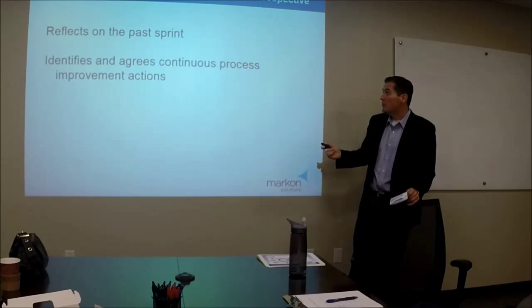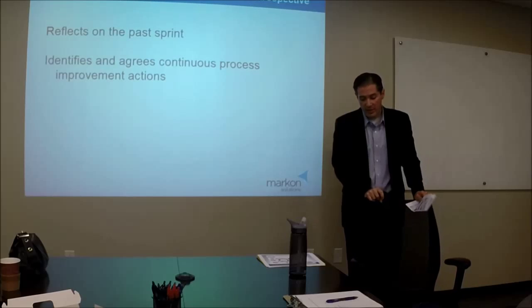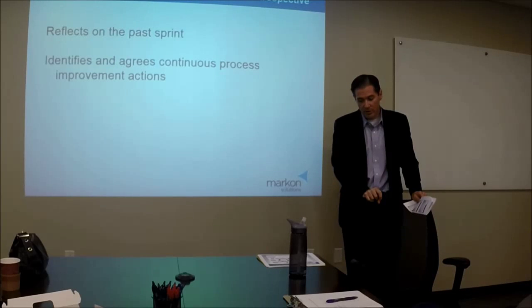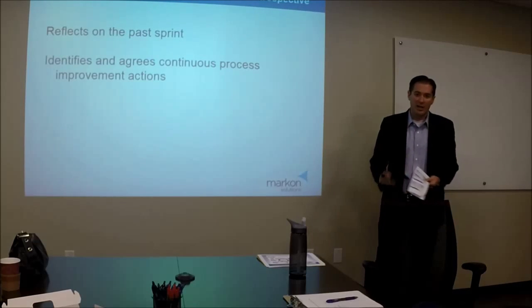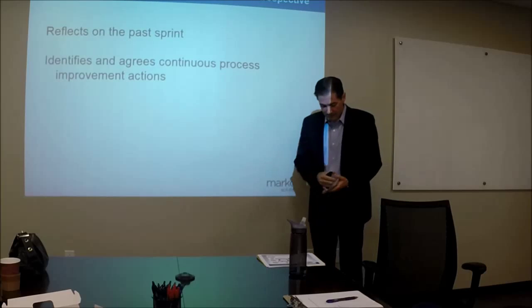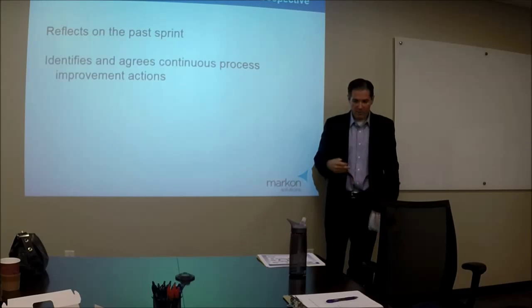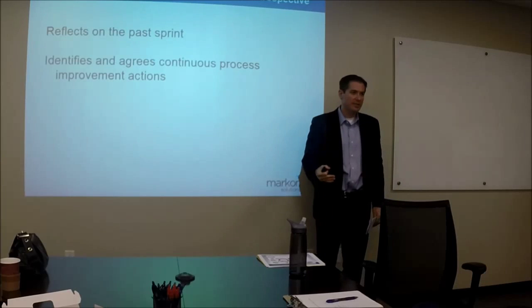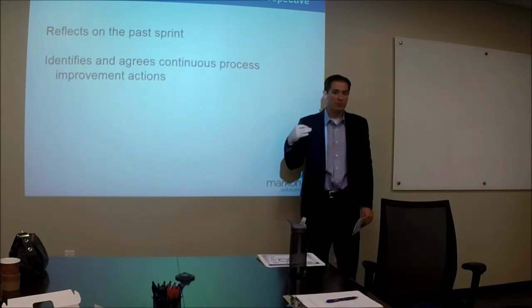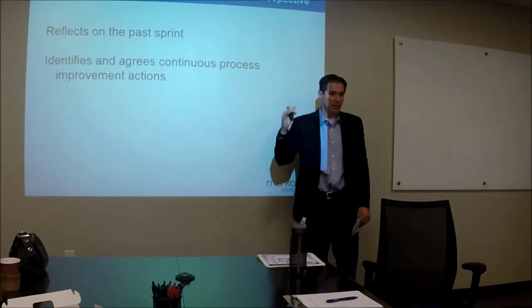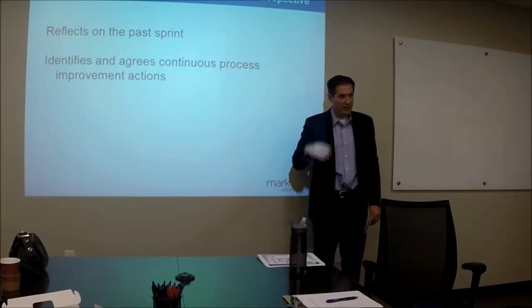After you've presented your shippable product to the product owner, best practice is that you have a retrospective right afterwards. The retrospective is kind of like a lessons learned after action report, however you want to say it. What did we do good this sprint as a team? What did we not do good as a team? We use a methodology of starts, stops, continues, thank yous, and shout outs. So we bucket our feedback in those 4 things.